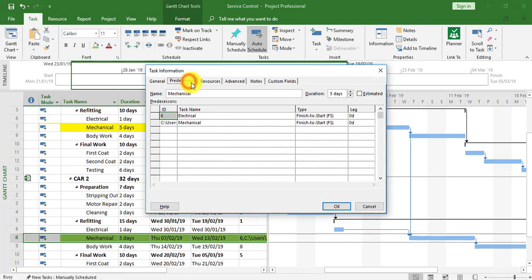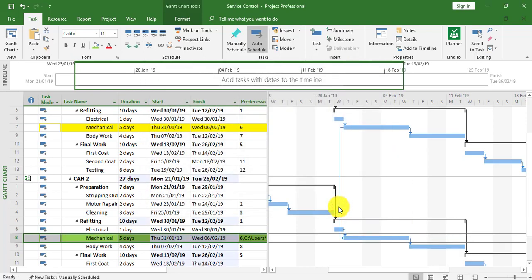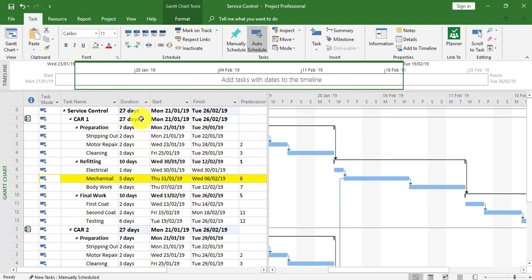In the predecessors section, where we know the link is taking place to the external task, I'm going to change finish-to-start to start-to-start and click OK. The link now changes to a start-to-start link between the yellow mechanical task in Car One and the green mechanical task in Car Two. The duration is now back to 27 days, the original before we linked these tasks.